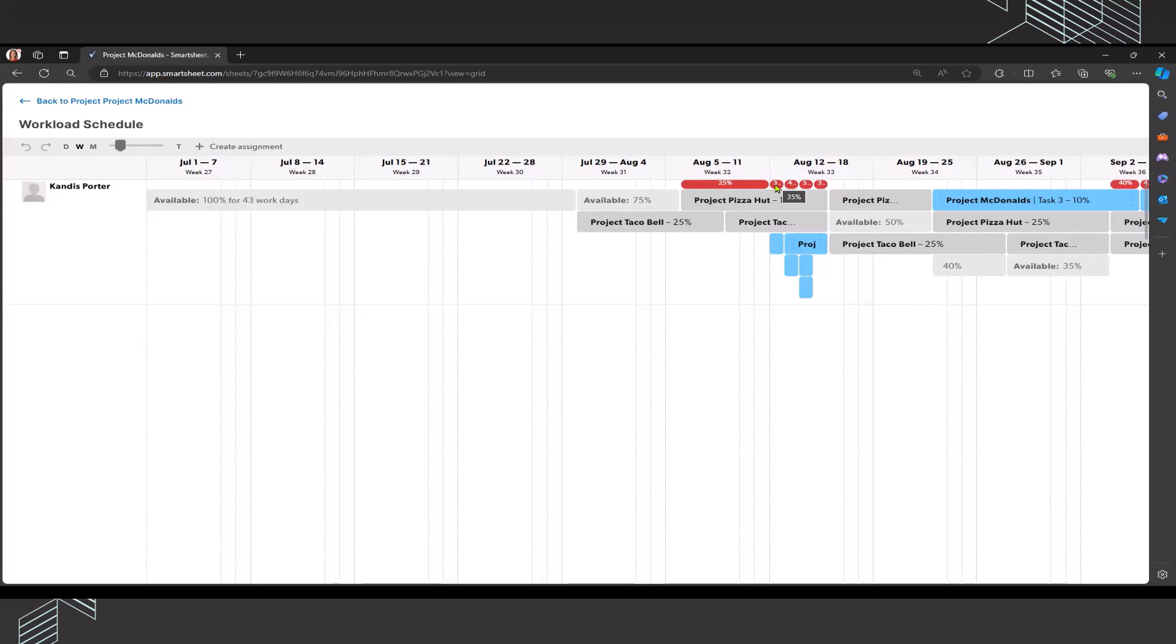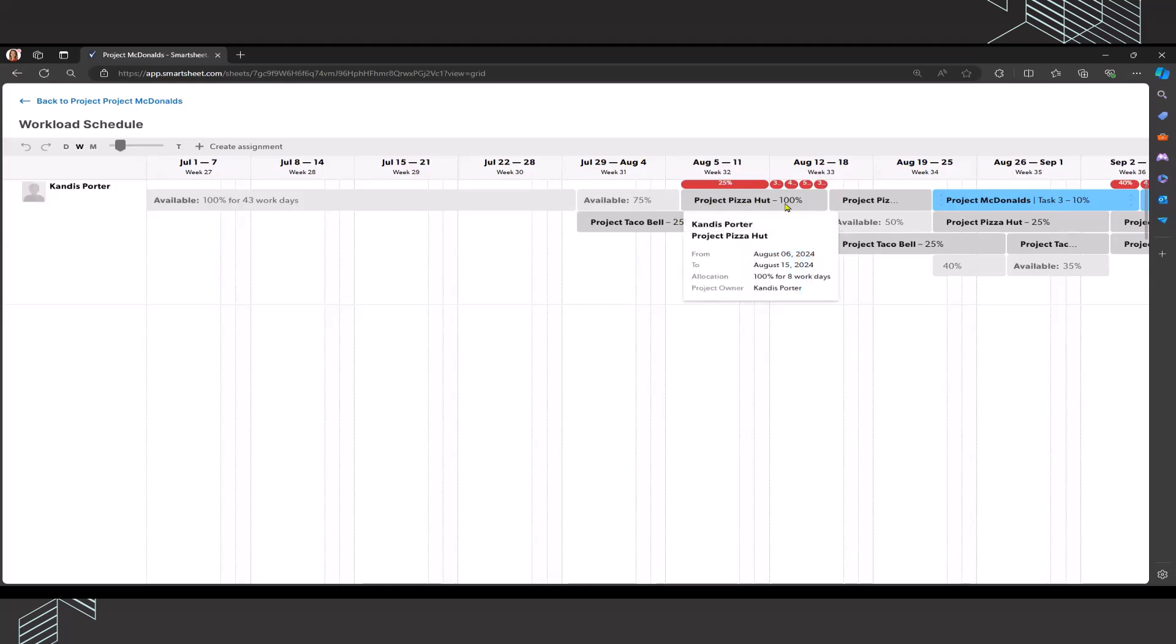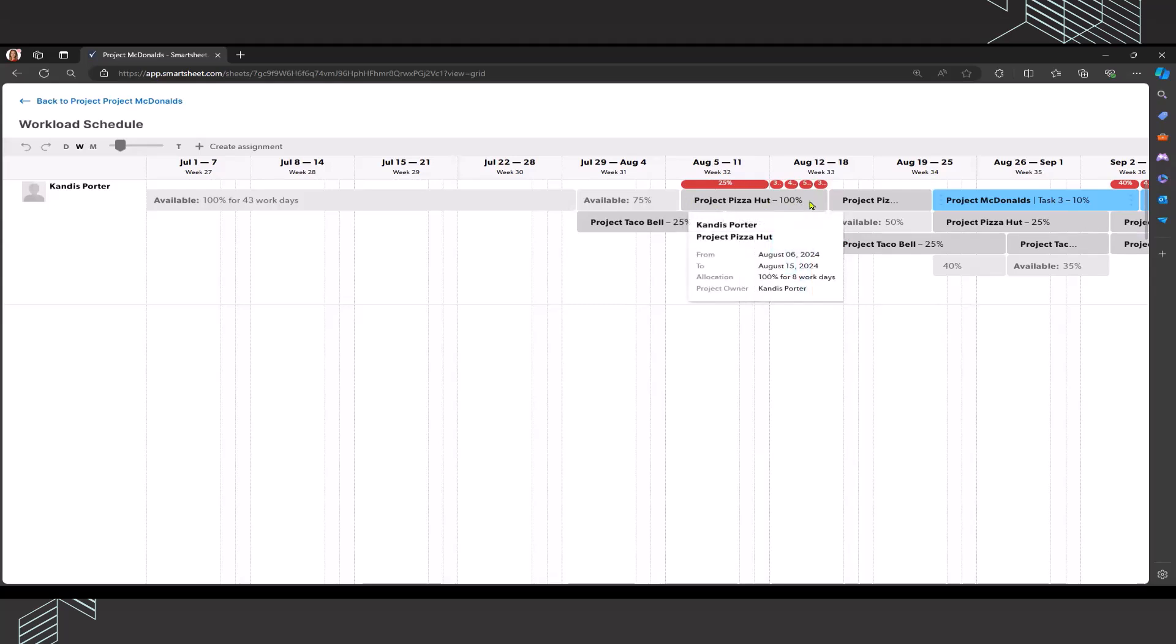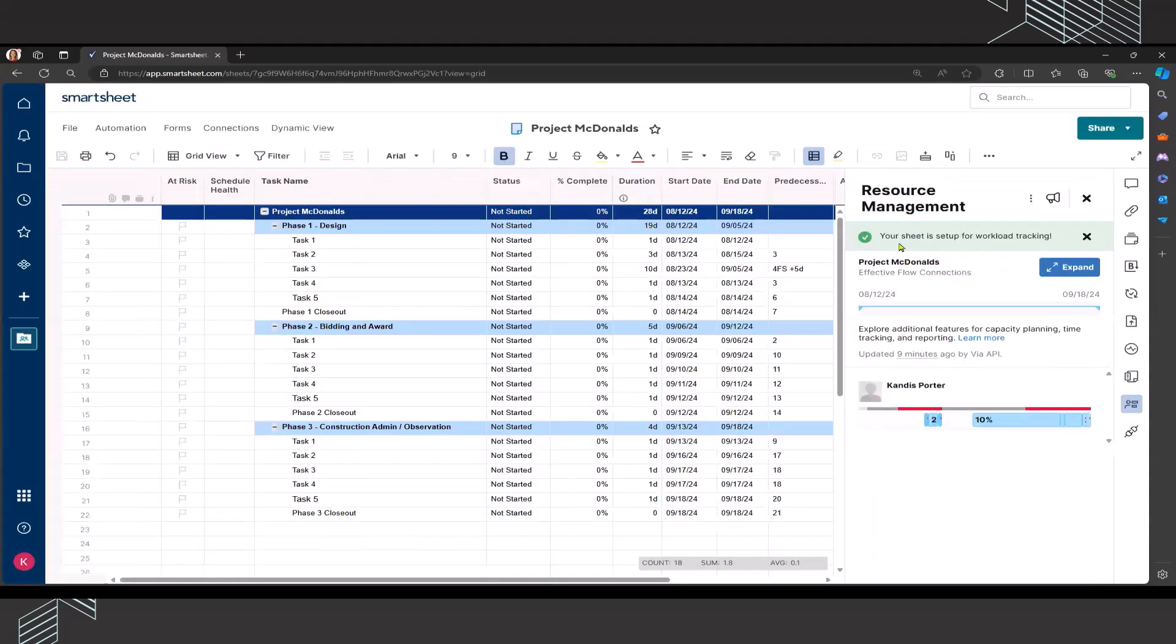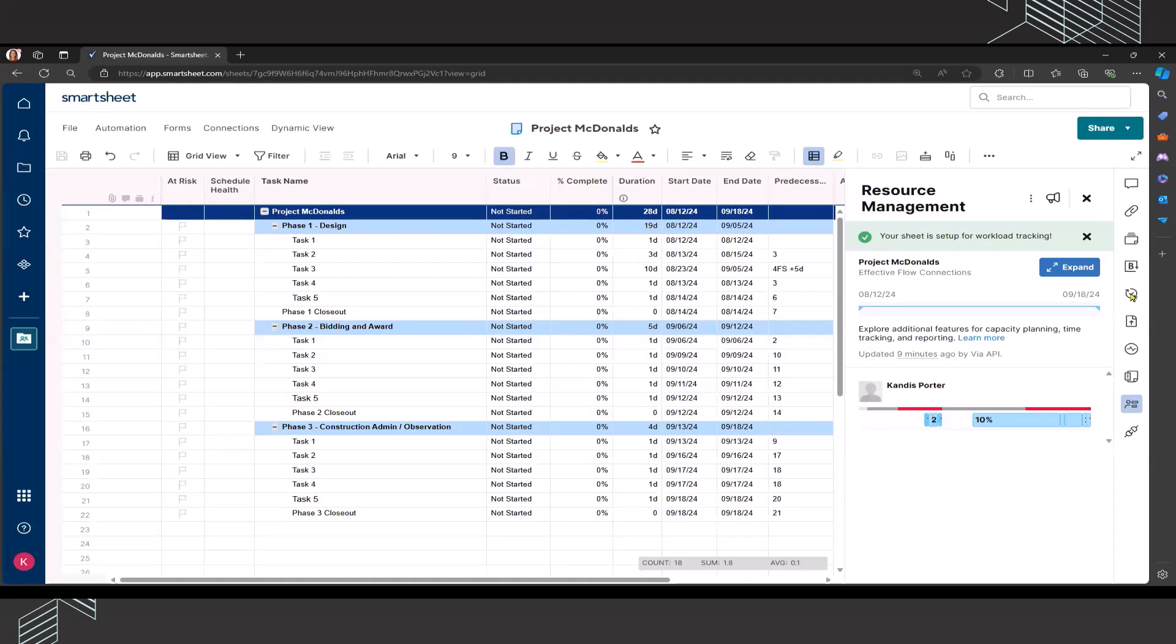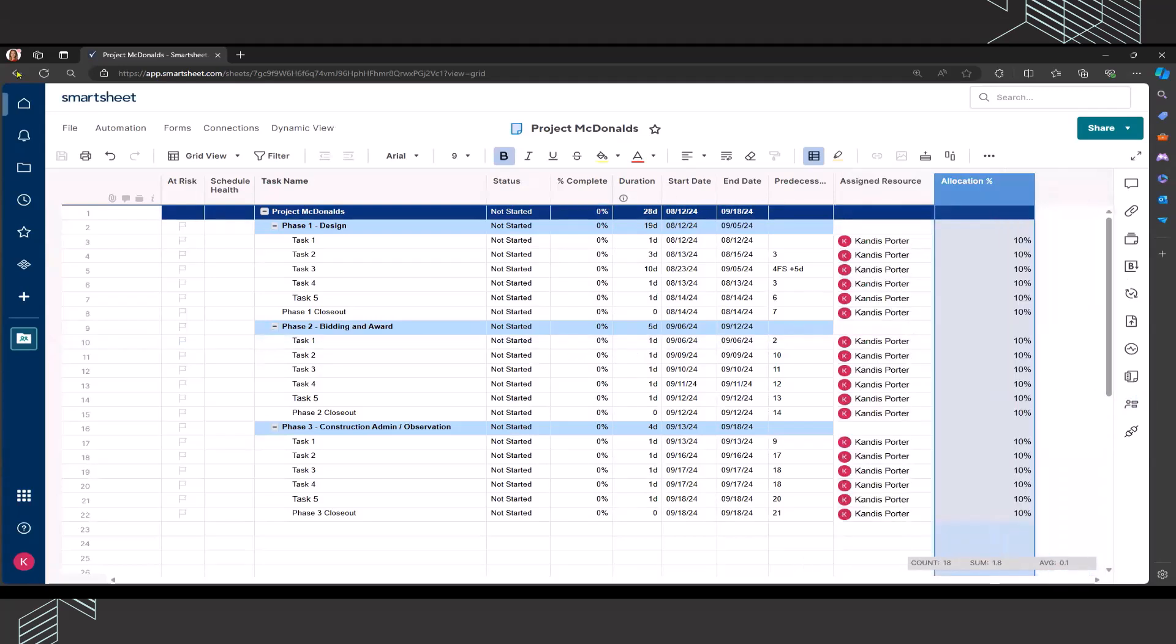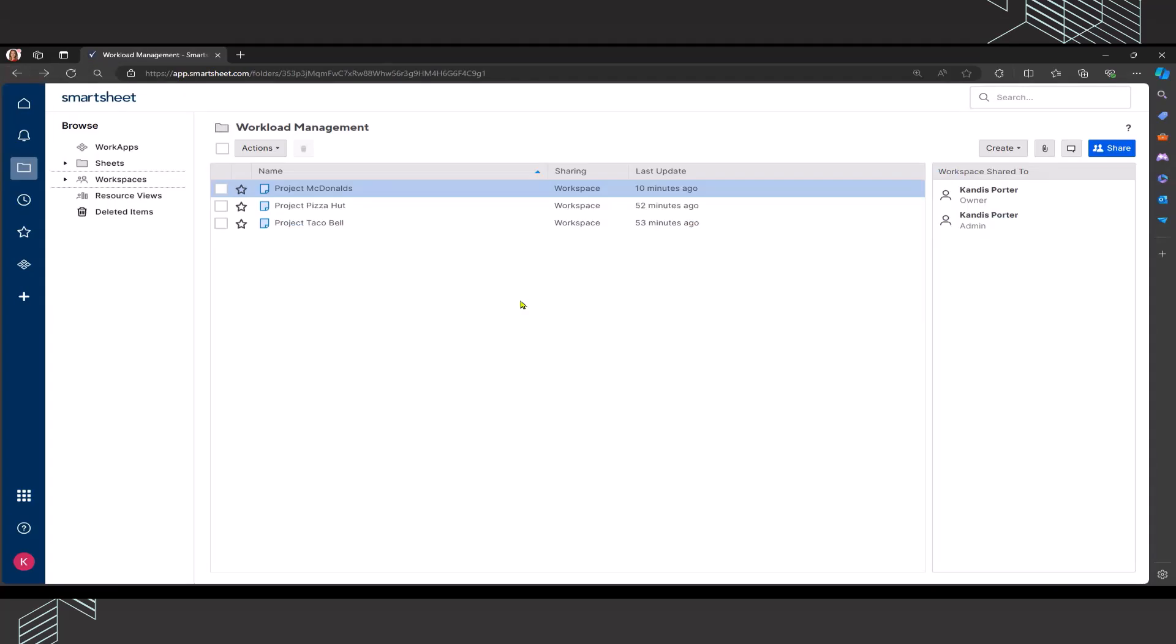I'm also over allocated by 35%, 45%, 55%, and so forth during that week. Before I make any adjustments, I am going to choose to go into project Pizza Hut and take a look at that because it's showing that I'm currently assigned at a hundred percent during that time period. All that I need to do is click the back button and it will take me back to my project plan. I can close out of the workload heat map. Then I'm going to click the back button and I am now back in the workspace.